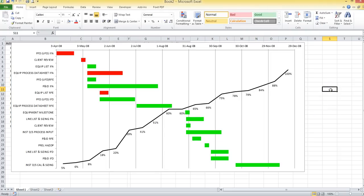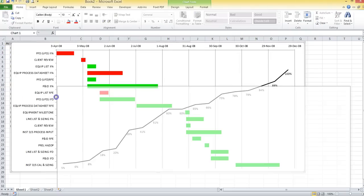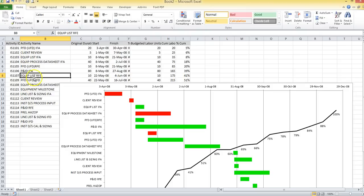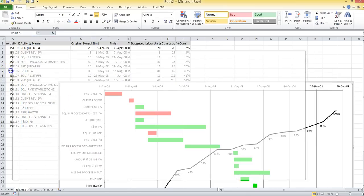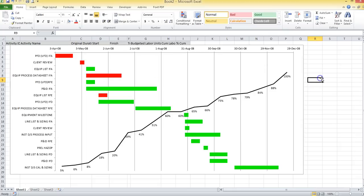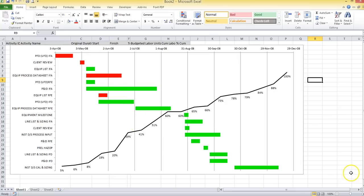And what you have is your Gantt in Excel — pretty easy, very updatable. You can insert lines, add more information, update it, and make it more dynamic. It will not run CPM, so logic dependency is not the case, but it represents what you're after in terms of deliverables over time — illustrating a Gantt chart.